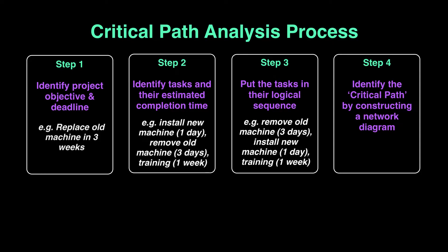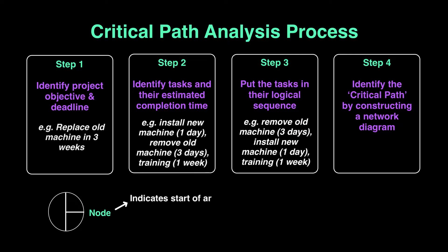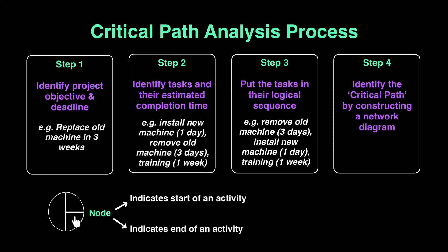The network diagram has two shapes. The first shape is called a node — it's a circle divided into three parts: a full left semicircle and the right side divided into two halves. A node is used to show two things: that an activity is starting from that point, or that an activity is ending at that point. The second shape is a straight line, which represents the activity itself. Together, these two shapes make up our network diagram.